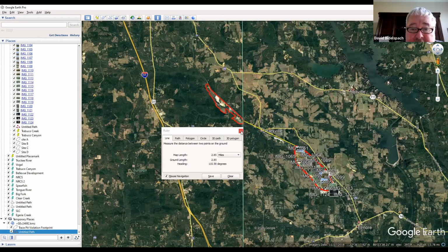And I'm going, yeah, but I said, they still haven't decided whether they want to take the impacts based on 2013 or 2007. I said, if you just do the bare minimum of 2013, they may still push back. If we throw in a little extra, maybe they won't question and force Elmore to go back to 2007. Let's just give them a little bit extra and say, here, we're trying to do the right thing. Help us out here, you know?